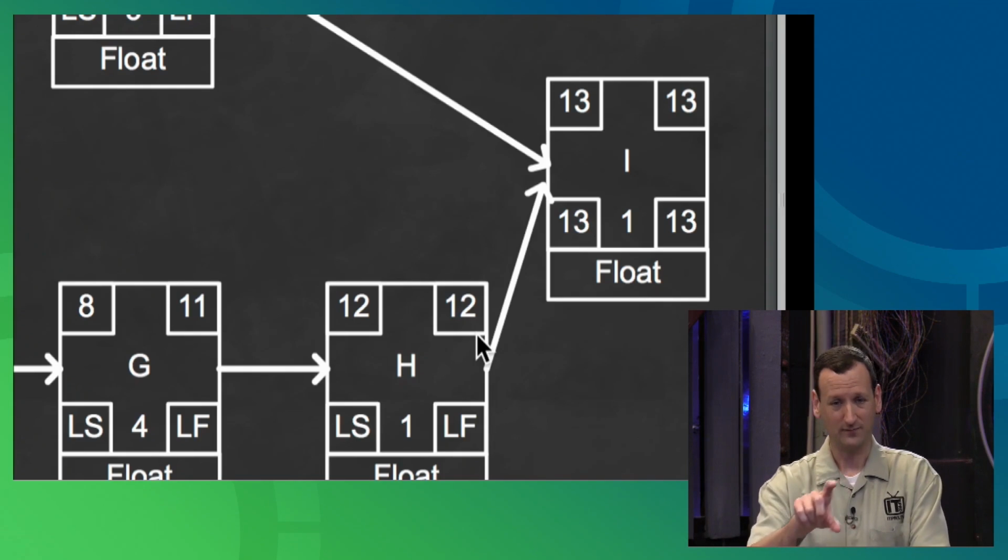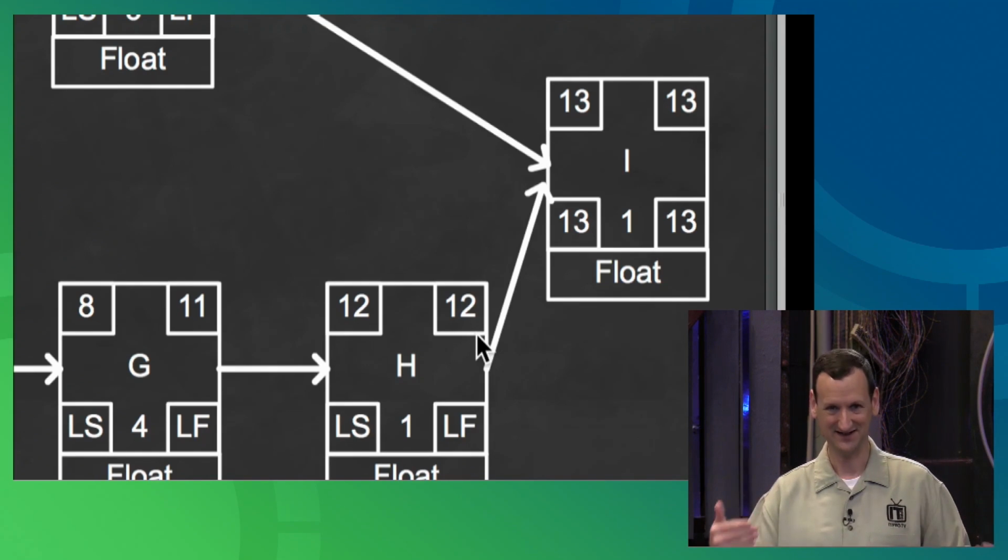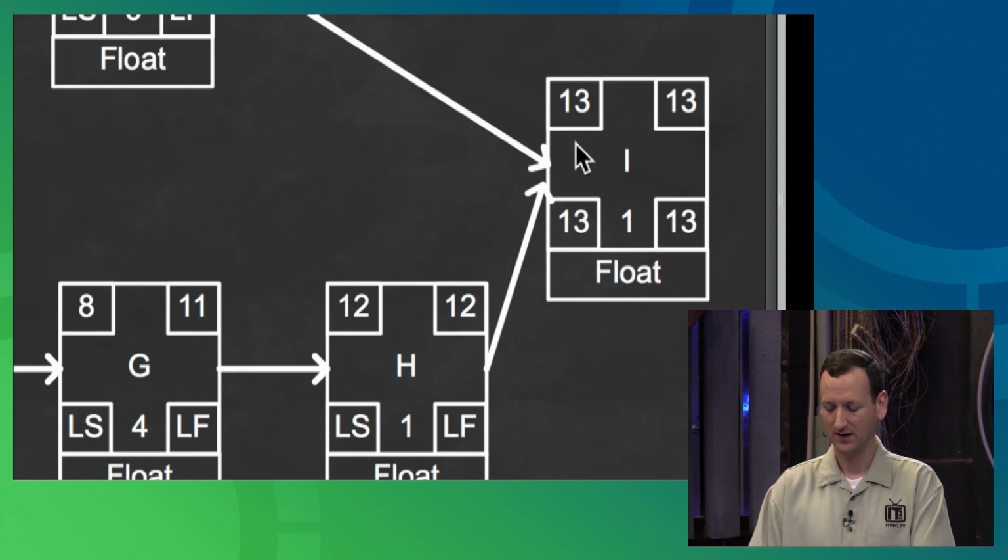But when they round the project off to a single point like this, then there's never float on the last activity, or there's never float on the first activity, because those are the beginning and the end. But if you have more than one endpoint, it is important. Okay. All right, now I'm going to leave float off for right now, because we'll calculate it in a minute,